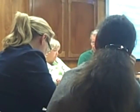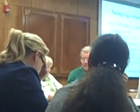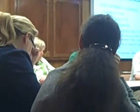So would they be calling you? It would be really good if they could call us while at least this bid's happening. At least we could take care of it with a change order as opposed to a whole other contract. Either that or it would get deferred and done at the same time as the enhancements. If I've got somebody at school X, it's going to be a lot cheaper to negotiate a change order if they're already mobilized, as opposed to rebidding it and paying general conditions.